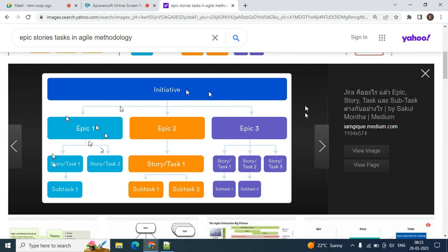So one big work is broken down into small works. And this story is assigned some time, usually they call it a sprint. A sprint can be defined by the project. Few projects say one sprint is 2 weeks. Others agree upon 4 weeks, 3 weeks, 6 weeks, etc. Not more than that.